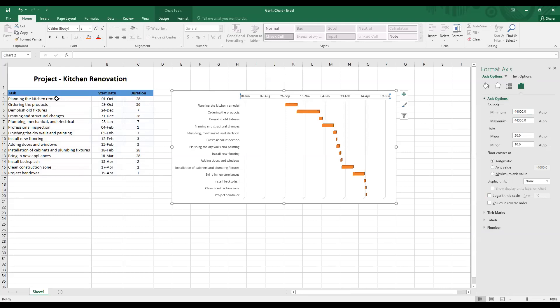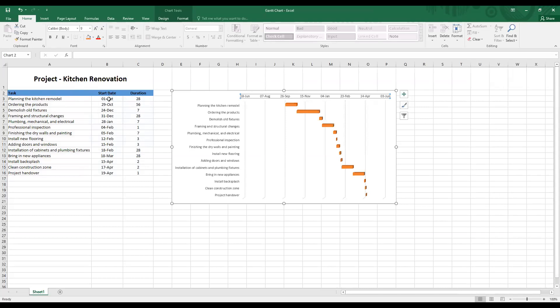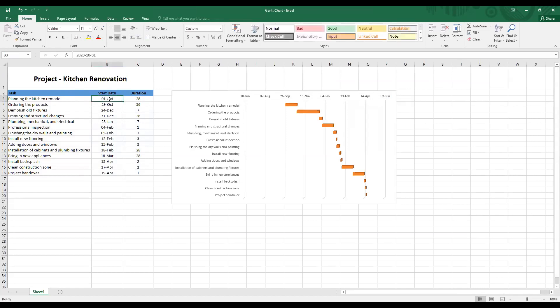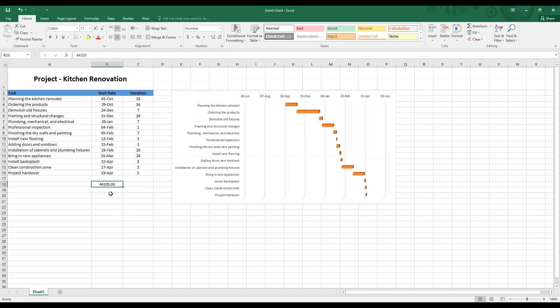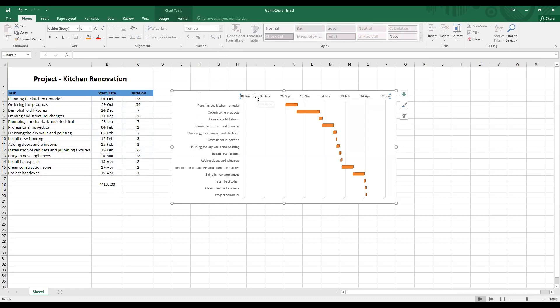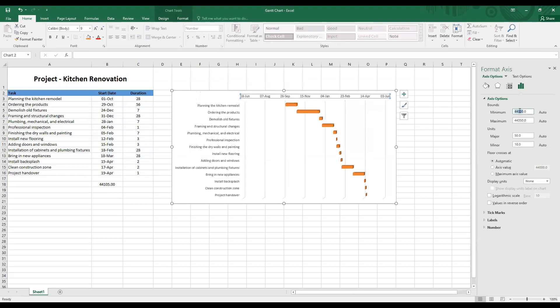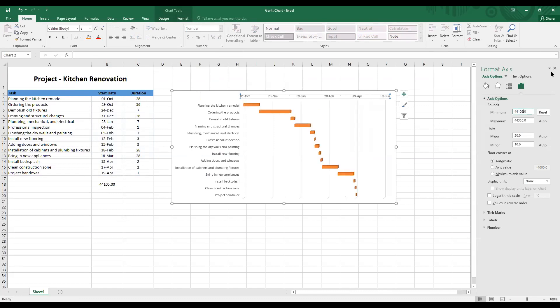Now how the number system works on Excel is they convert any dates into a general number. So let's consider the first start date, 1st October. Let me copy this into this cell here. And then under custom, I'm going to choose the number format. So the number format is 44,105. I will use this number to edit the date. And then right click format axis under minimum values. Change it to 44,105. 44,105 indicates 1st of October. And then click enter.